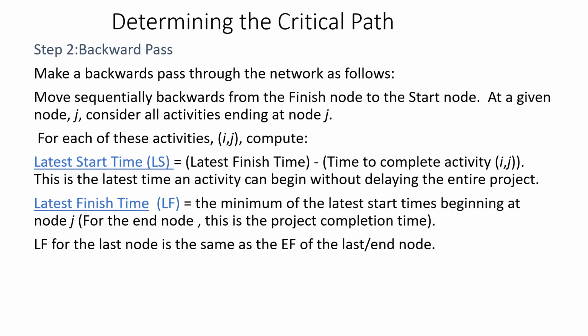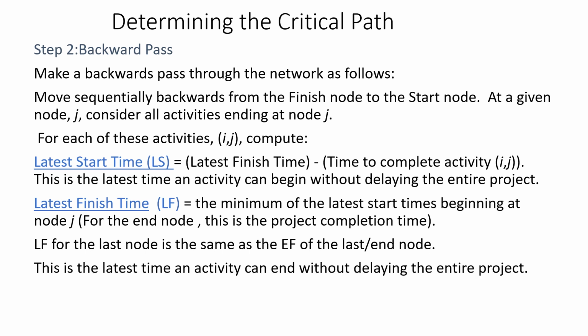Now, it is important to remember that the latest finish time LF for the last node is the same as EF of the last or end node. This is the latest time an activity can end without delaying the entire project.